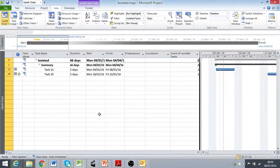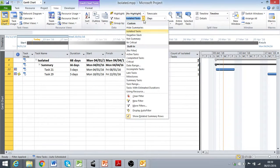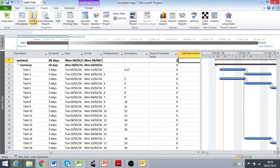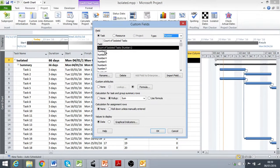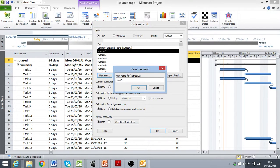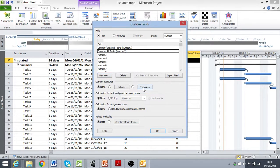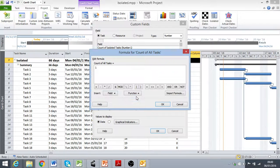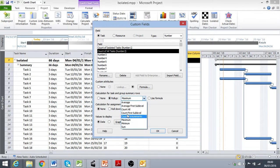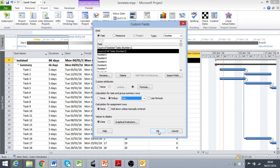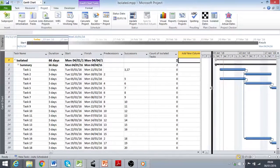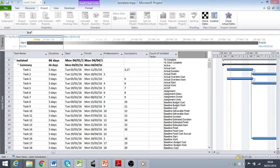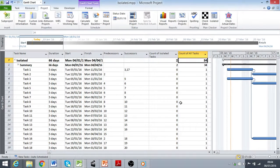In order to get my percentage metric for the percentage of isolated tasks in this project, I'm going to need to also count the number of tasks in total. So I'm going to use another custom field. I'm going to use number 2, rename this, count of all tasks. And in the formula, I'm just going to return the number 1 for each task. And for my summarization, again I'm going to sum up to the project summary level, so I get a total for all the activities in the project. And then I can add this column too to my table. Add new column, number 2, count of all tasks, telling me I have 34 tasks in this project.